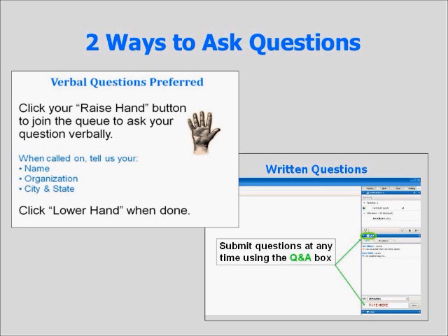Mostly what people are doing is requests for qualifications, because that's really what you're trying to figure out: who's capable of doing this sort of work. If you go that route, it's less time-consuming and complicated than something like a full construction contract bidding process. Right. Okay. Thank you.